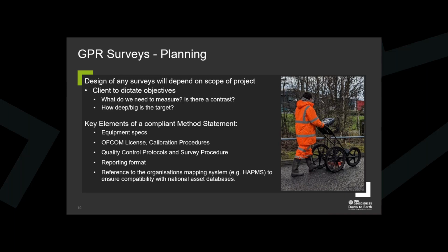Once we know what we are going to do on site, we can prepare the survey plans and risk assessment and method statements, which can be shared with the client for review and comment. And after that, we can start preparing for the actual going to site and the layout of the job and how we're going to do it.